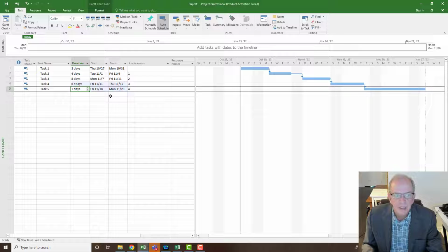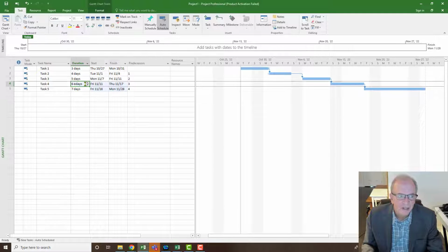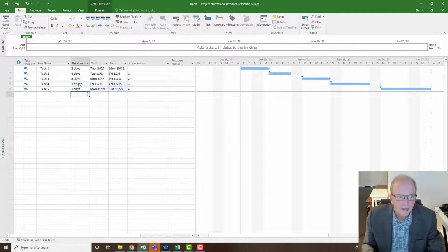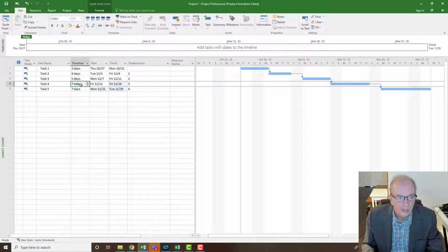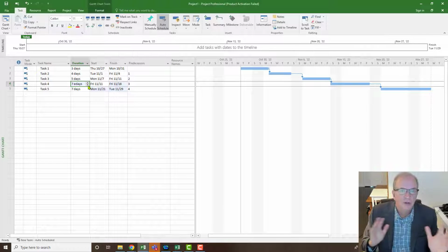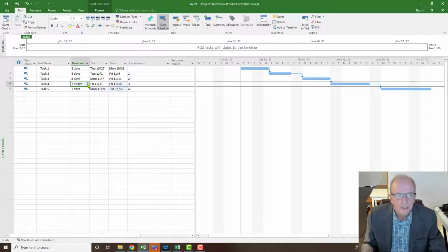And so when I do 6 elapsed days, you see it started on the Saturday and the Sunday, and now it finishes on the Thursday. So it's counting Saturday and Sunday. That might be good for something like concrete curing. If I did that activity, in concrete, typically, you know, we might leave it 7 days, right? That would allow it to go right through the Saturday and Sunday. It's not like concrete, you know, Friday night comes and says, oh, I'm not going to cure anymore. No, it keeps curing. So you want it to count wherever it hits a window, weekend in those cases.